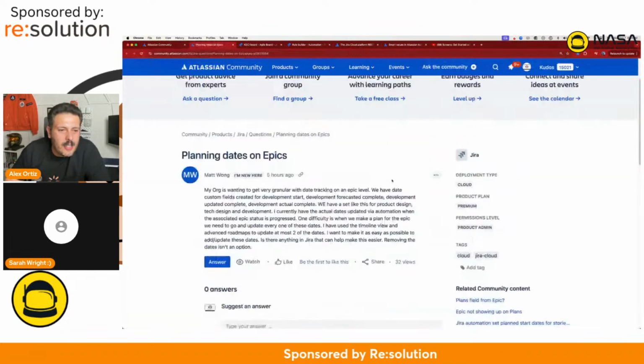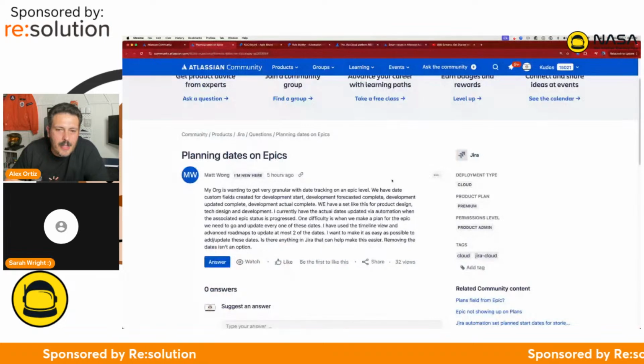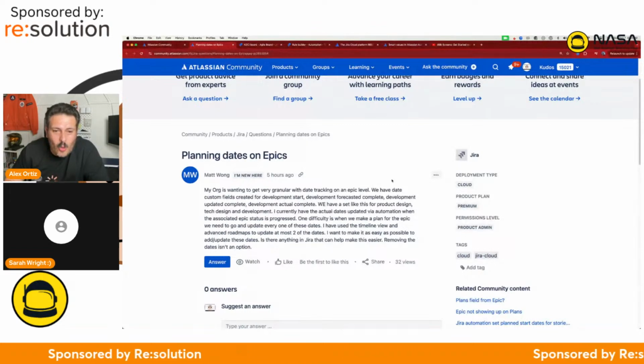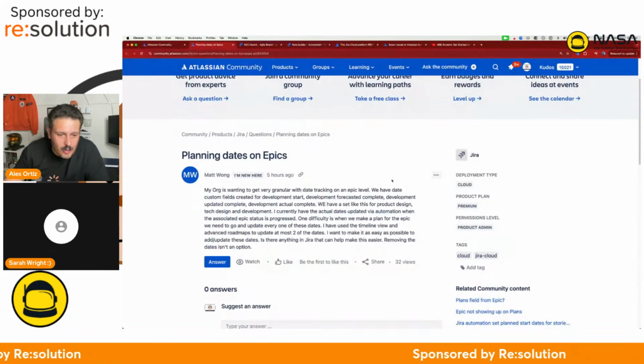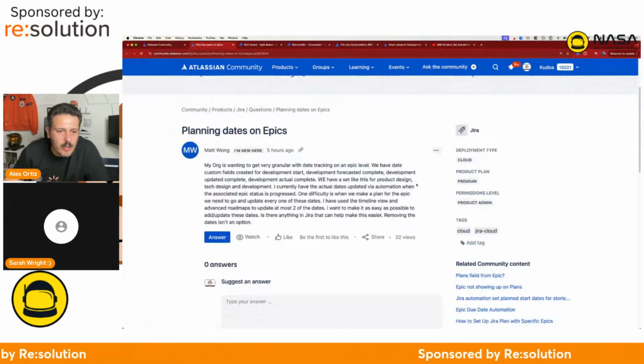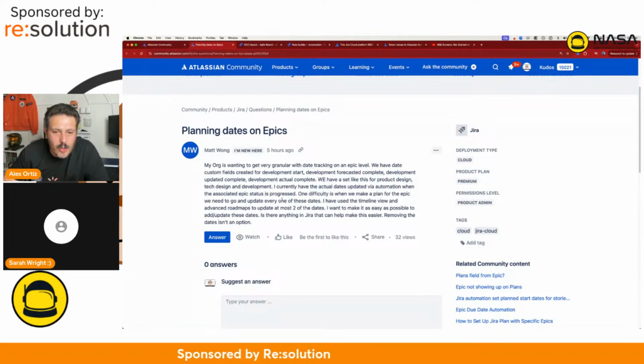Matt Wong says, my org is wanting to get very granular with date tracking on an epic level. We have date custom fields created for development: start development, forecasted complete development, updated complete development, actual complete. Holy moly. There's no answers, of course. We have a set like this for product design, tech design, and development. I currently have the actual dates updated via automation when the associated epic status is progressed. One difficulty is when we plan for the epic, we need to go and update every one of those dates.